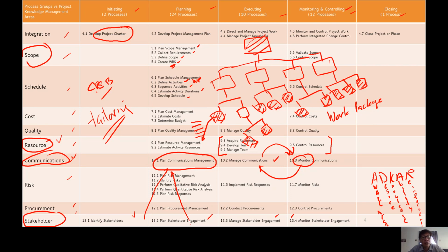That's how we plan or estimate our activity resources, both physical resources, like equipment, materials, facilities, allowances, hotel accommodation needed for every one of those work packages, as well as the human resource requirement. Engineers, a trainer, whatever is pertaining to the particular work package or activity. And we get them in. We acquire those resources, both physical as well as human.